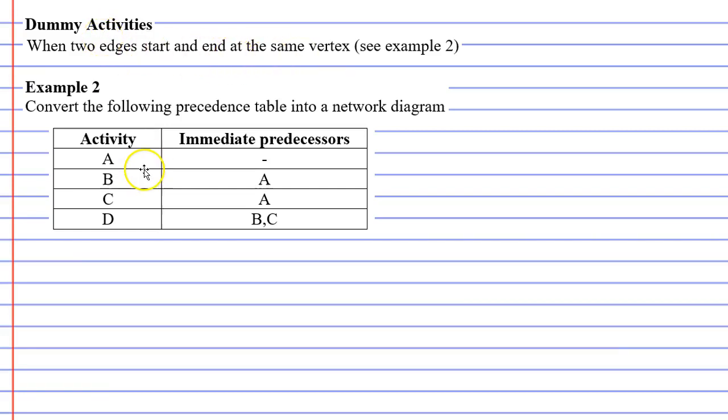So let's get right into the example. We're going to convert the following precedence table into a network diagram. We need a vertex where we're going to start, a starting vertex. We can see that activity A doesn't have any immediate predecessors, so that one's going to come out from the start vertex. We'll call that edge A.